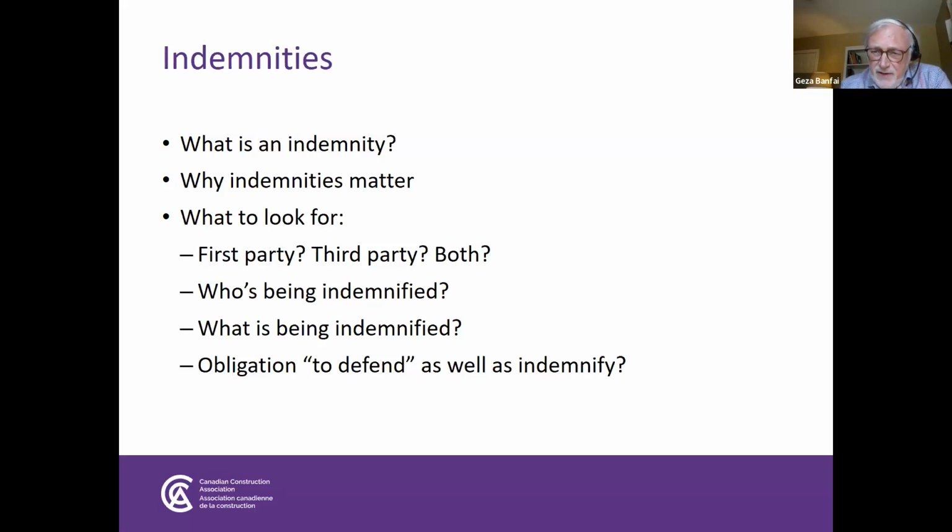The question is to ask the owner, are you really sure you want us to do this, owner? Because your interest in any claim may be different than ours, the GC's. Furthermore, if I'm the GC and I have an obligation to defend you, that means that I get to pick the lawyer and I get to pick the settlement strategy and the litigation strategy. And are you sure you want that? That's the kind of conversation about defend. So it's just a heads up to you.